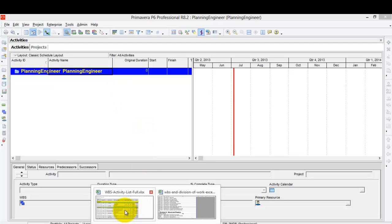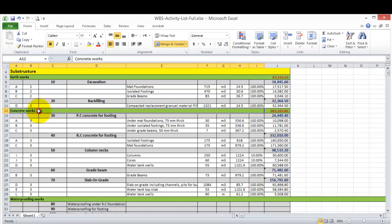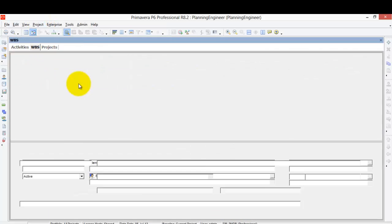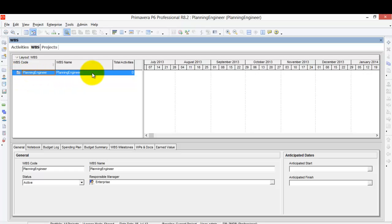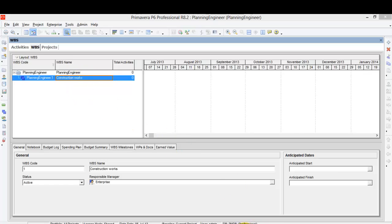We already have our WBS created in the previous lesson for cost loading. From lesson number five on cost loading, you'll find that we already divided the blocks into smaller components — each representing a WBS level. I'm going to use the same breakdown in Primavera. From the Project WBS menu, the first WBS level is 'Planning Engineer,' and I'm going to add a new one called 'Construction.'